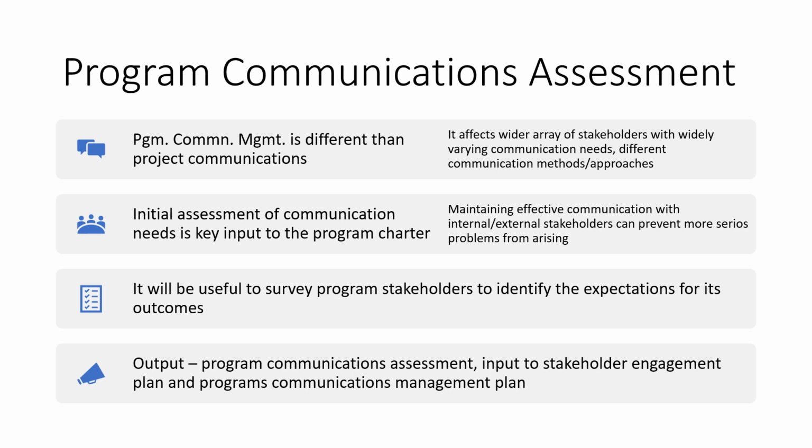It will be useful to survey program stakeholders to identify their expectations for its outcomes. You can interview your important stakeholders, the program sponsor, other management leadership, or even customers, and identify their expectations in terms of communication. What is the frequency of reports? What is the frequency of updates they are looking for?